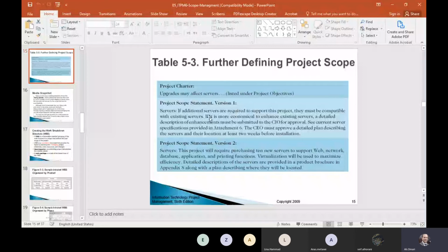Project charter is basically a simple document, probably one or two pages. It signs the start of the project by your sponsor. So your sponsor will give you the go-ahead by signing this charter, and then you start the project. So you enter into the project.